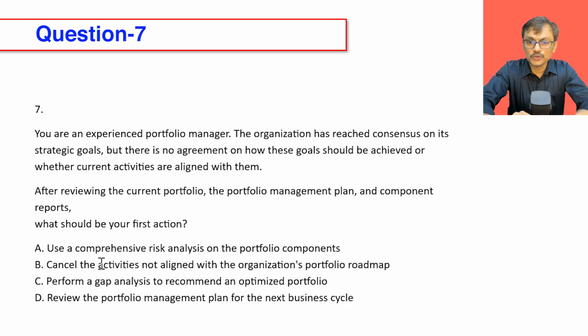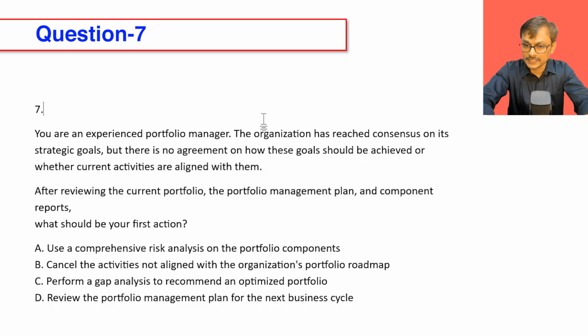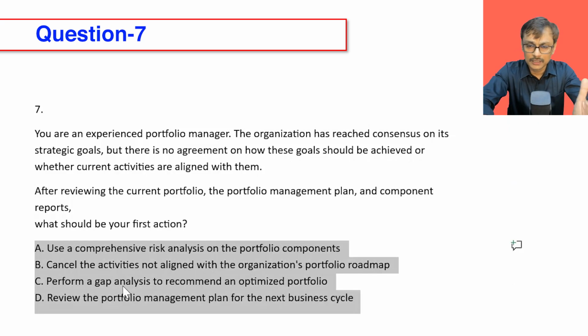Perform a gap analysis to recommend an optimized portfolio. Looks good. Yeah, I'm understanding, because I get the current state of the portfolio by looking at this. I get the future state of the portfolio by looking at the strategy. So I need to come up with the various possible scenarios which can help us in reaching there. So I can do a gap analysis and come up with the recommendation.